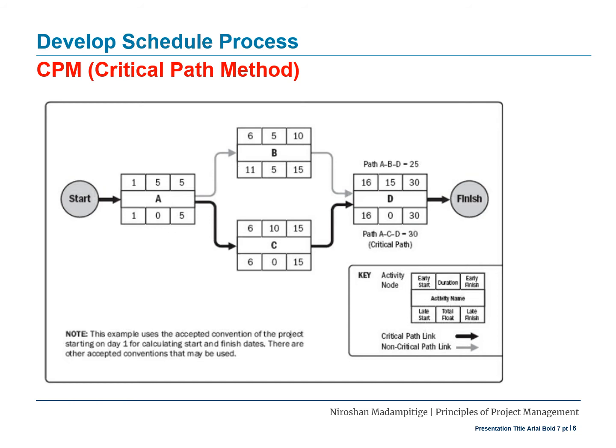As implemented with the precedence diagramming method sequencing, critical paths may have positive, zero, or negative total float depending on the constraints applied. Positive total float is caused when the backward pass is calculated from a schedule constraint that is later than the early finish date that has been calculated during forward pass calculation.